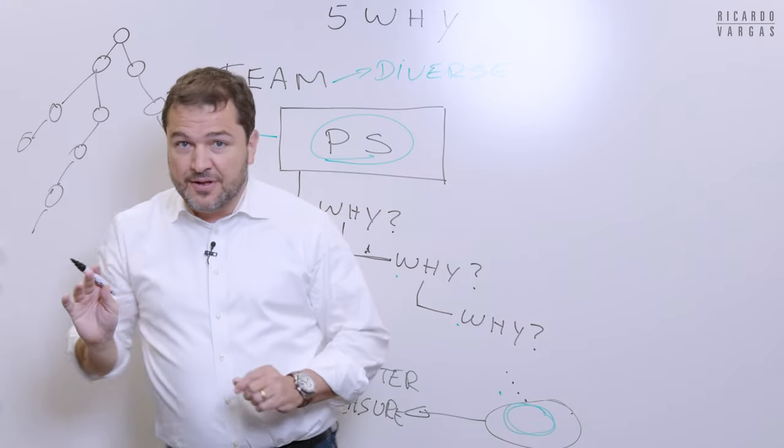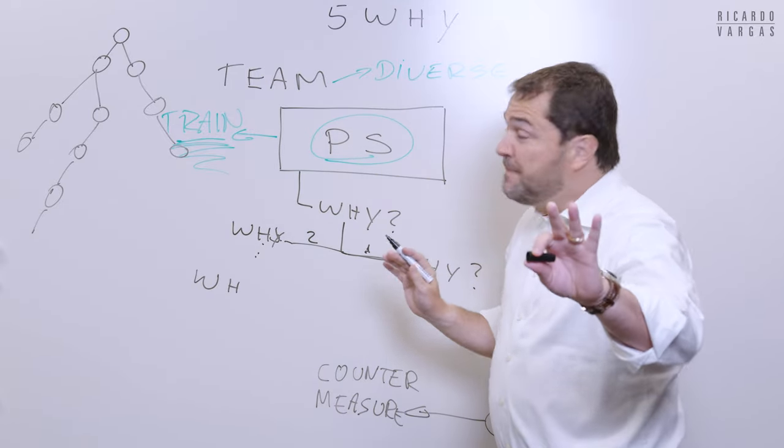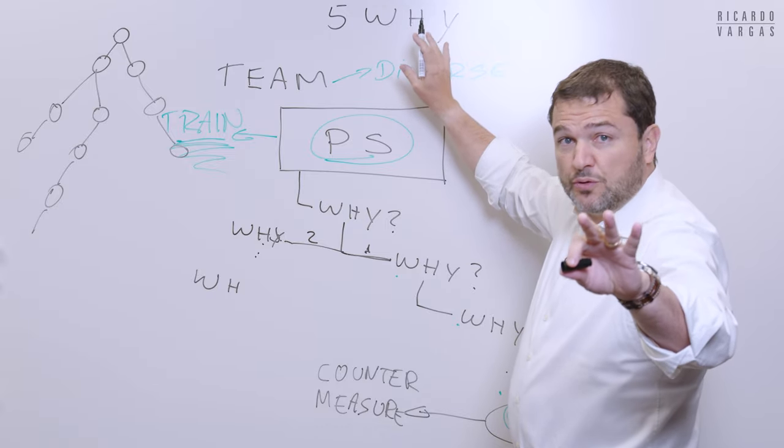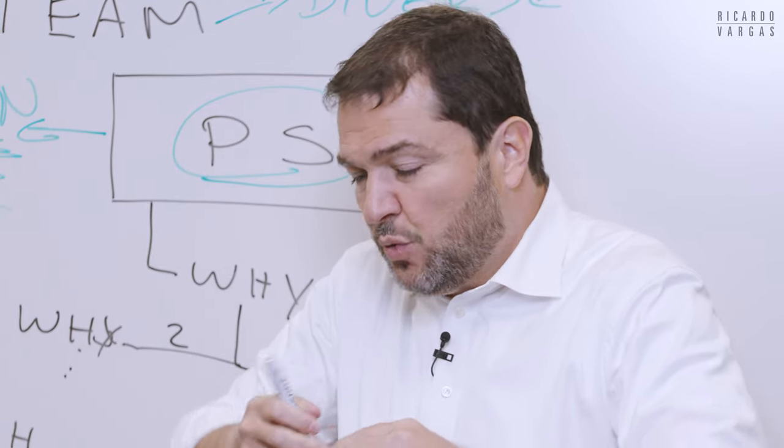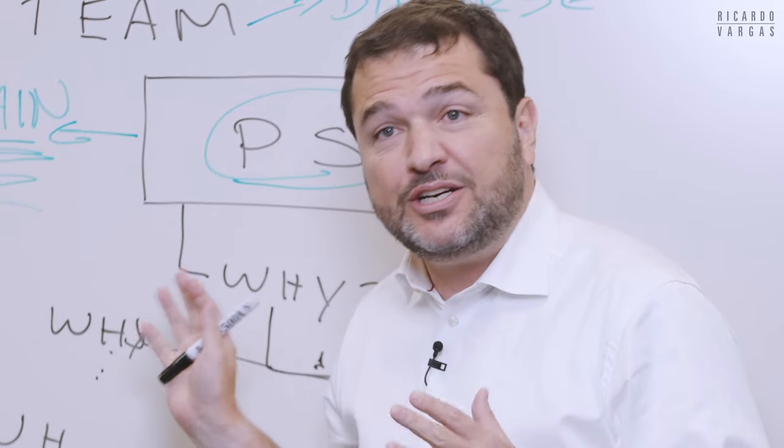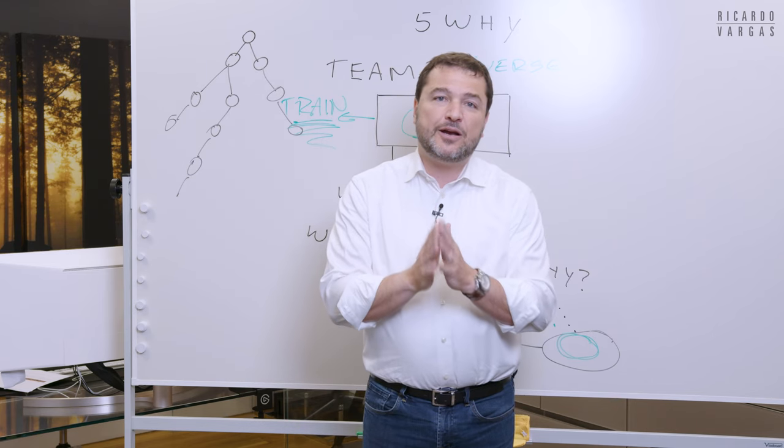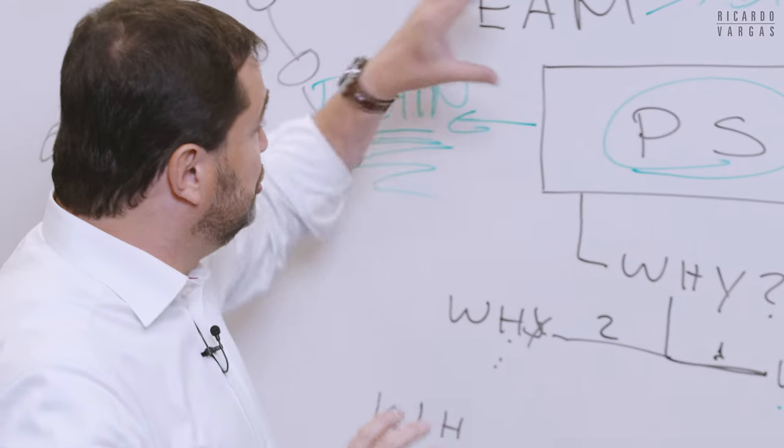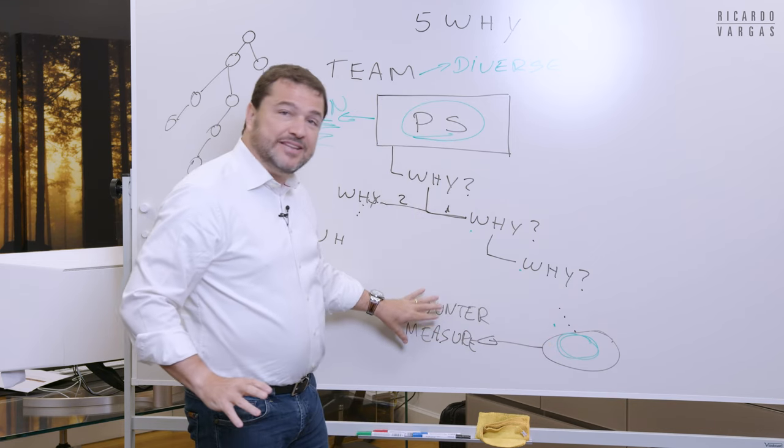What I suggest if, for each why, there are so many answers, maybe five whys is not the best tool for you to solve. Then you should use FMEA, root cause analysis and other tools. This one is supposed to address in a simple and direct way. This is something that you do in a group. And in a couple of minutes, you go from a problem to a solution. And then you can act on that solution.